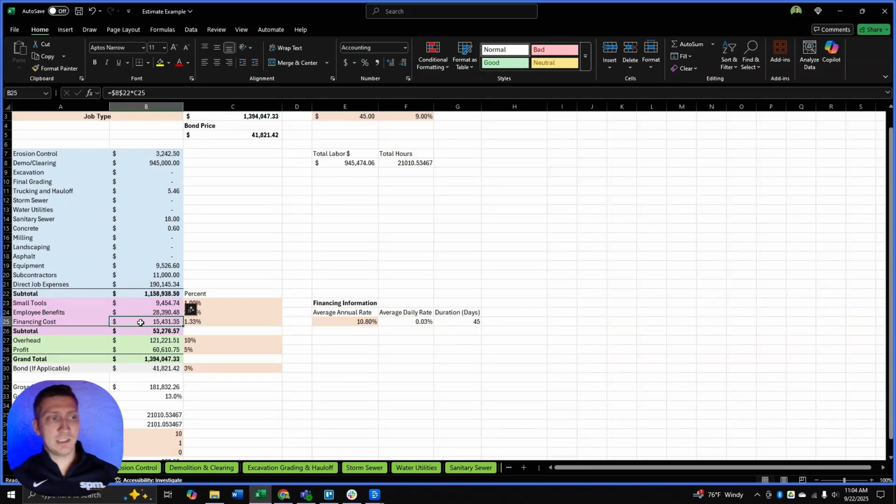If you didn't charge that $15,000, I know people are going to say, well, I'm not going to win jobs if I just add all these things on. But if you don't, that $15,000 comes out of your profit. So if you look at this 60,000, earlier we talked about you had your vehicles, but that was, I want to say like $20,000. You have your cost of financing, that's $15,000. You have your PM time, your foreman time, your safety time. All of those have to get done. Well, pretty soon this number is gone.